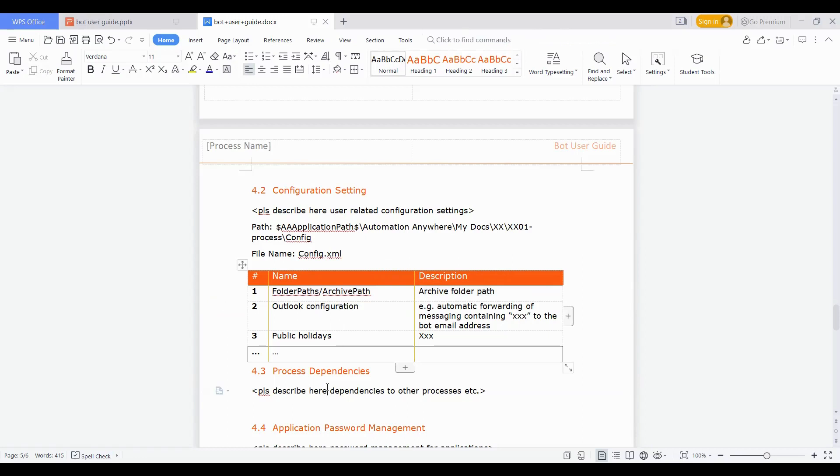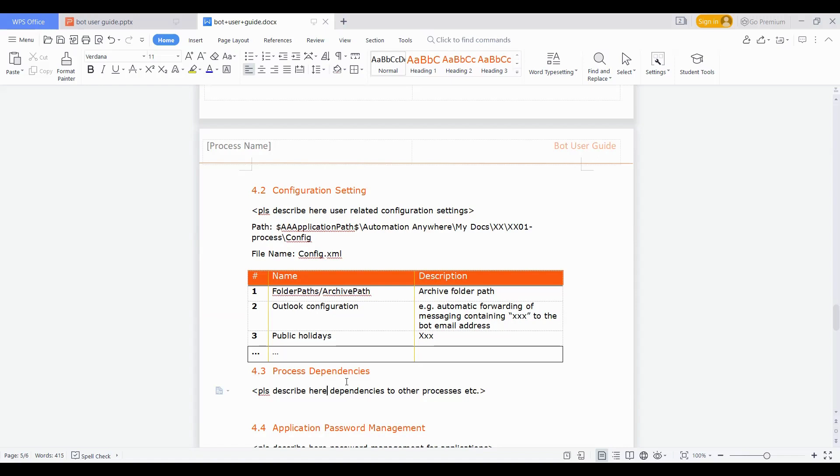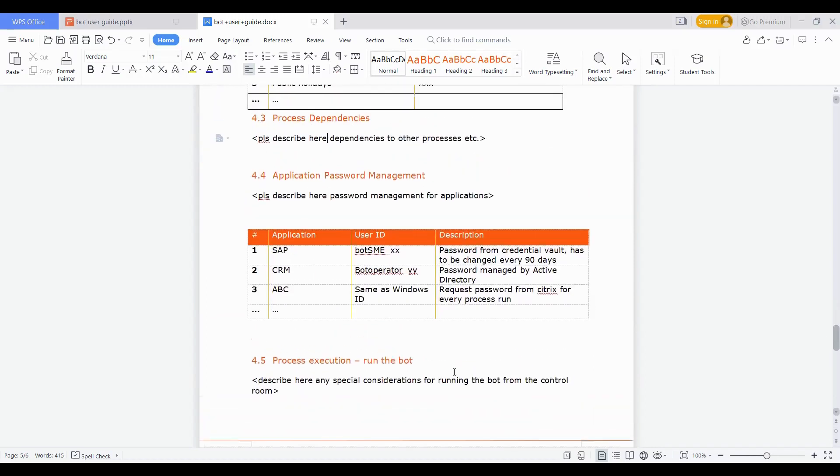The next one is on process dependencies. For example, if your process is dependent on any other process, there can be more than one team which is working on the same process and the work is segregated team by team, and you are maybe automating part of a second team. The second team work will only start once the first team work is complete. That's the kind of process dependencies we are talking about. That needs to be clearly called out that if team A has to generate the file first and post that the second process can start or begin, then that needs to be called out so that in future if anything happens, everyone has clear idea on what could have been the possible failure reasons.